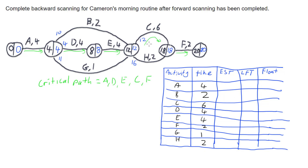The earliest start times from forward scanning are: A was 0, B was 4, C was 12, D was 4, E was 8, F was 18, G starts at 4, and H starts at 12.